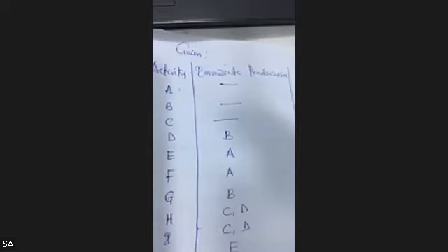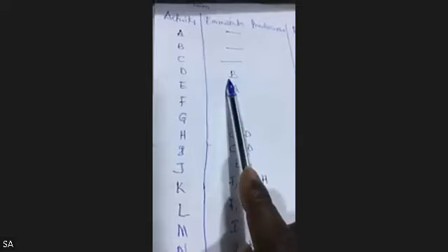This is the point I want to bring out. That's why I say it's a little bit complex, but please pay attention. Once you see that this activity comes after this, this comes after this, I have to say, okay, there is B here and another B here. Does that make B independent? Because this starts where B ends, and activity G also starts where B ends. What is that telling us? Very importantly, D begins after B has ended, and G also starts when B has ended.